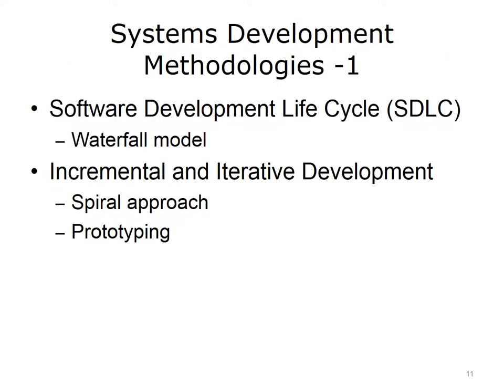There are many different methodologies for developing information systems, several of which will be discussed here. One of them, the SDLC, we just described. It is a waterfall model, in that its stages are implemented sequentially, with the output of one stage becoming the input for the next stage. Strictly following this sequence requires much planning up front, with little flexibility left for changes during the later stages. Waterfall models are rarely used nowadays, because it has become common practice to allow for feedback and iteration during the development stages.